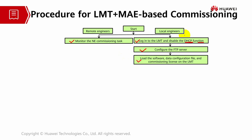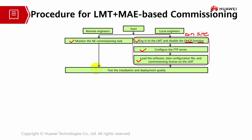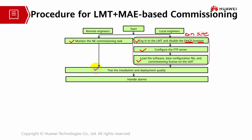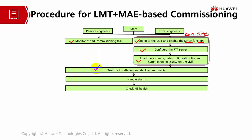The local engineer will configure the FTP server and load the software data configuration file — this is being done at the site level, on site already. The engineer will load the software data configuration file and commissioning license on the LMT. After that, the remote engineer will test the installation and deployment quality using the MAE platform, handle alarms once the overall process is completed, and perform a health check.